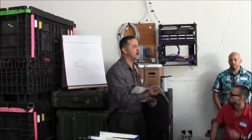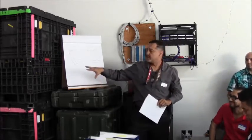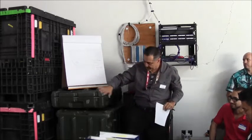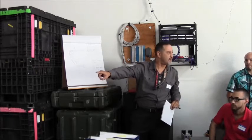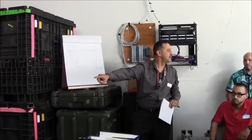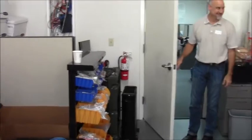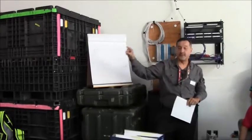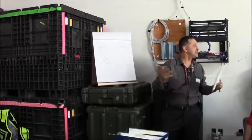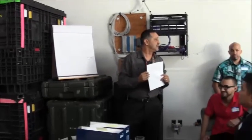We're actually going to be installing at the Super Bowl, about 70 of these. There's about 48 cameras in here, and each of these, behind that door where you are, John, can you shut that a little bit? You guys see the monitor and the keyboard and the server? That's all cameras. So we gotta run fiber to 70 of those. And since it's a 48 port switch, we gotta run 48 cameras to that one area. So you could imagine the Super Bowl, how big the parking lot in Santa Clara is gonna be, installing 70 of those in 1 month. Well, actually a month and a half.